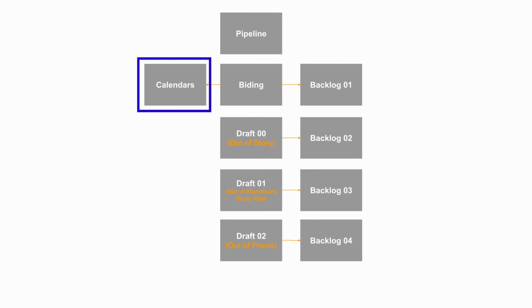You will have a project calendar after bidding, which shows working and non-working days. After you add crew, you should have this calendar for everybody separately. The crew calendar will help you know about the presence and absence of a person, to let the team know for